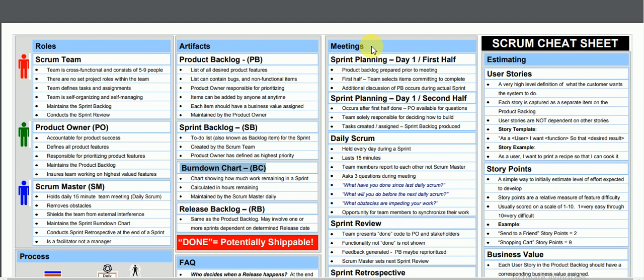And also, in sprint planning, we are going to give the story points. Story points are the Fibonacci series: 1, 1, 2, 3, 5, 8, 13, 21. So, Fibonacci series. Now you may wonder, what is the importance of a story point? A story point tells us the criticality and complexity of the story. If there are fewer points, there is less complexity. If there are more points, there is more complexity.